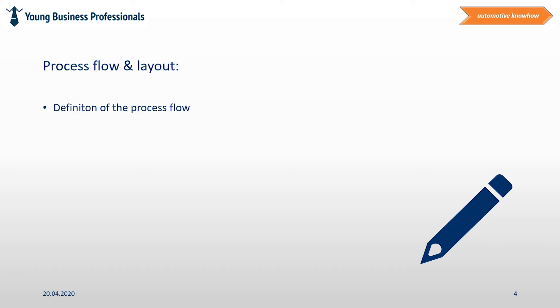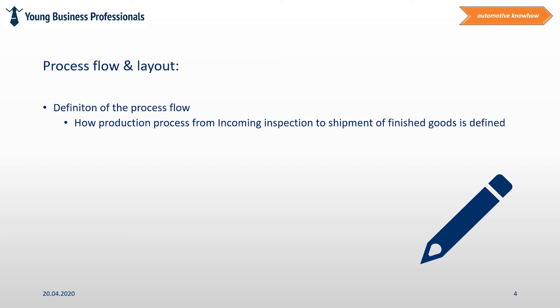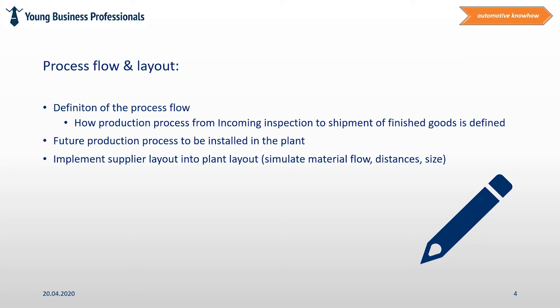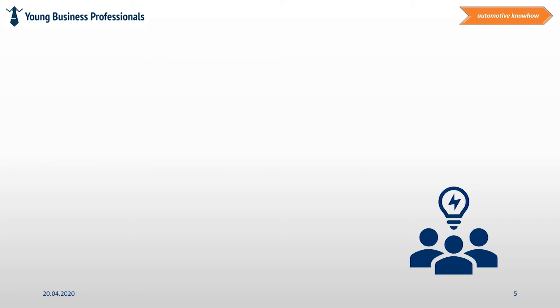Process flow and layout. It is useful to know as soon as possible if the process that shall be installed into the production plant later on can be installed without any constraint from a dimensional point of view, and if the flow of the material is reasonable. A process flow plan helps to design the process and shows how the process runs, starting from receipt of incoming materials until shipment of finished goods from the production plant. This is also an important input for the process FMEA and control plan, and it is a simple tool that helps outside people to understand the flow of the process.